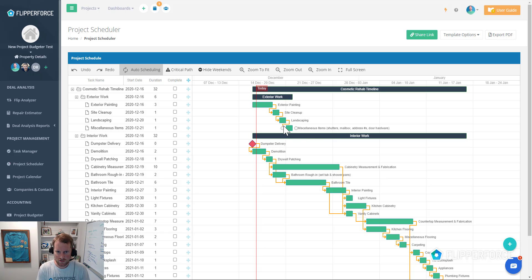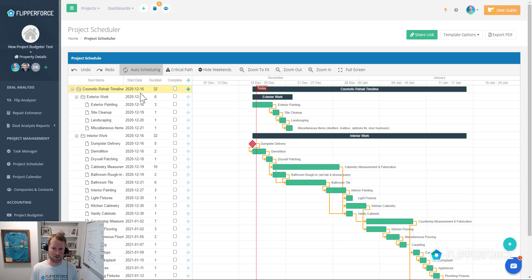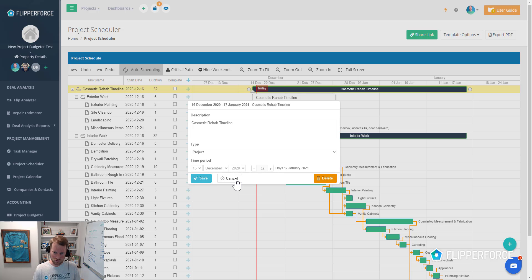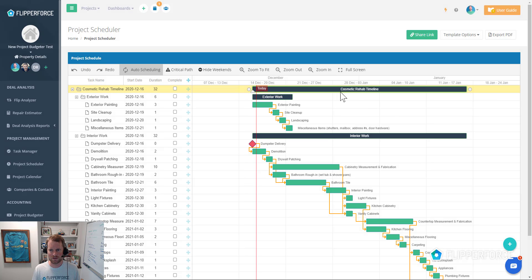The most commonly requested question we always get is: how do you change the start date of the overall timeline? A lot of users try to just edit the cosmetic rehab timeline task to change the overall timeline. You'll notice when you try to do that, it's grayed out so you can't actually edit it. The time period starts on the 16th and the overall duration is 32 — you can't change anything there. That's because the overall start date and duration are actually based upon all of the subtasks below it.